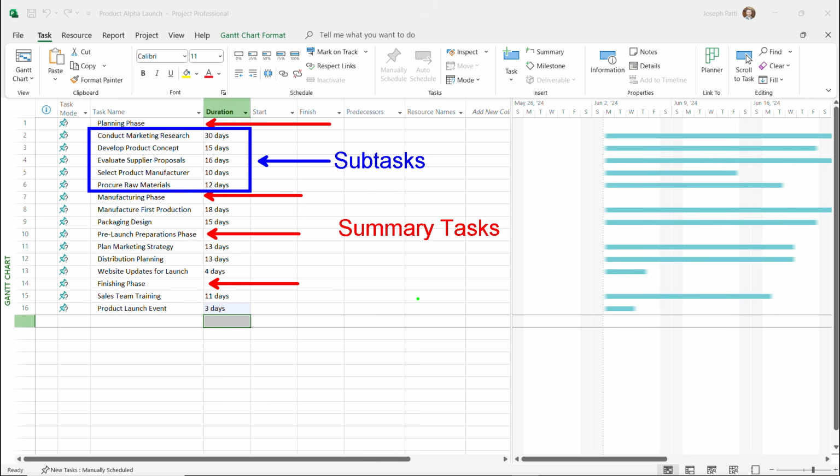The third type that we have is known as a milestone task. And this just marks a milestone inside of your project. So we have it set up for summary tasks and subtasks. And later on, when we start to work on our work breakdown structure, we're going to then create a relationship by using hierarchy. Now, before we get into any of that, let's add in a couple of our milestone tasks. Like I said, a milestone task allows for us to just simply put in information or milestones throughout our entire project. Now, we're going to keep this as simple as possible.